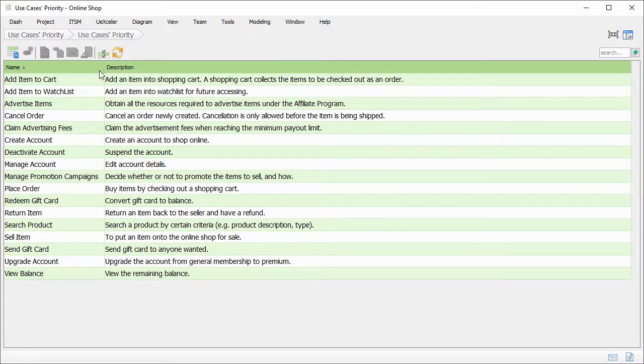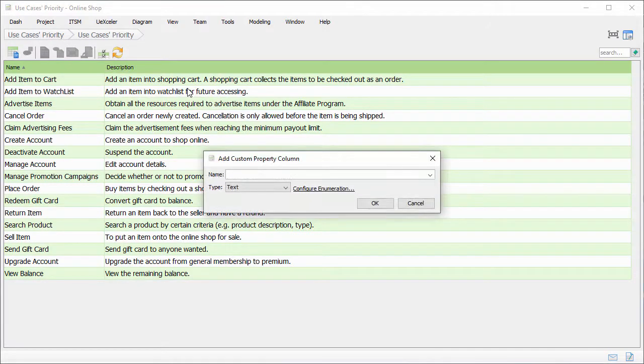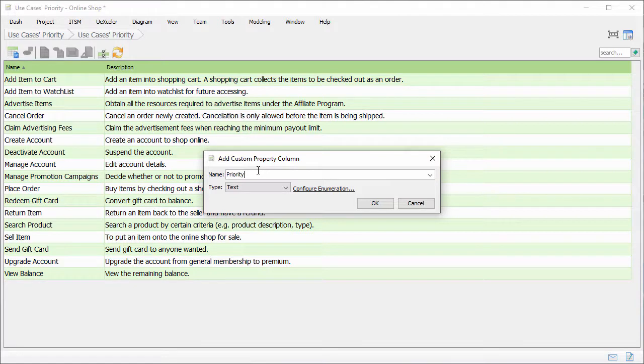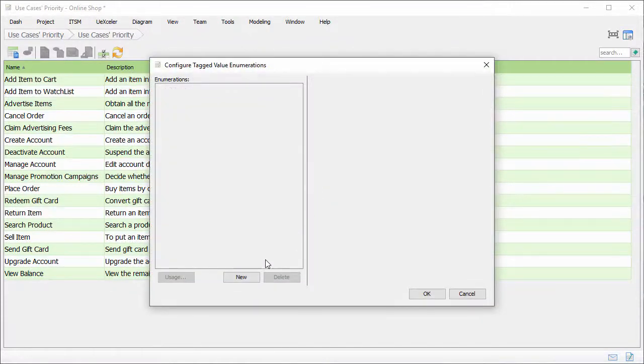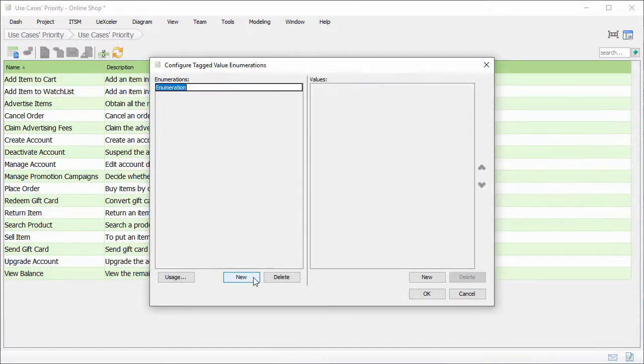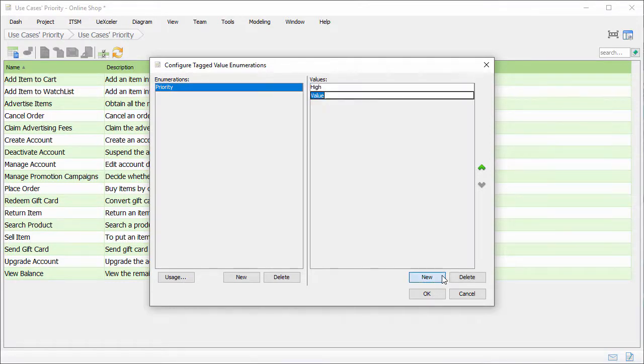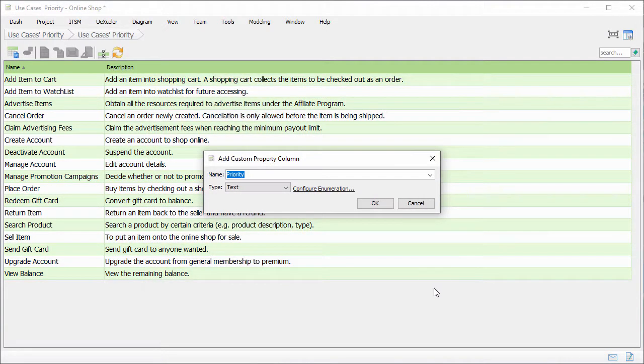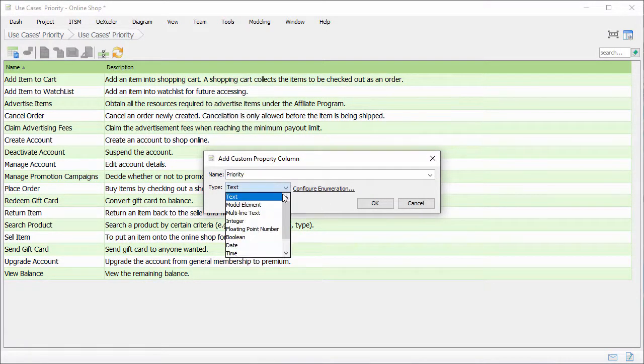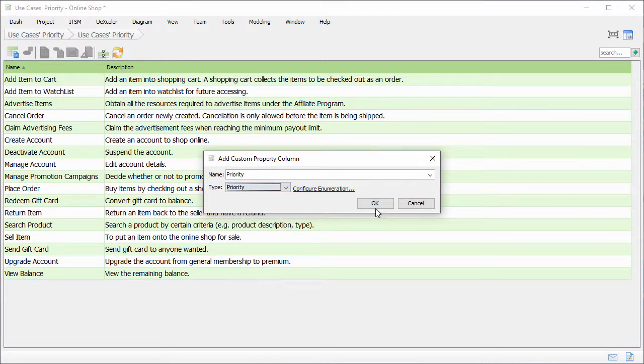Right click on the table header and select add custom property column. I name it priority. I want to restrict the value to be either high, medium, or low. To do this, create an enumeration. Select configure enumeration. Click new. Enter the name of enumerations, which is priority in this case. Click new to enter a value. Say high, the next value medium, and low. Click OK to confirm. I set the type of the property to be priority. And confirm.